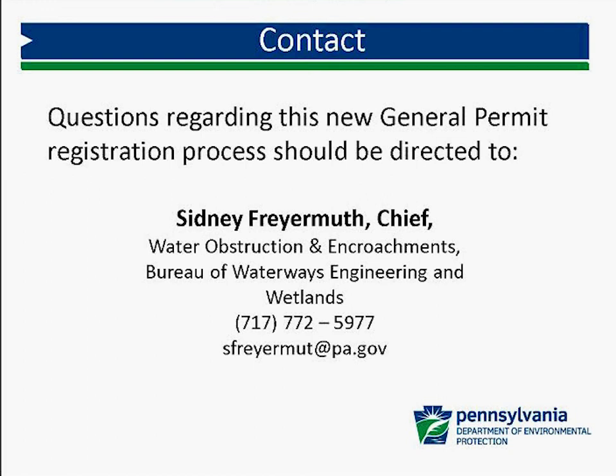Since the E&S plan may be submitted separately, what if the review of the E&S changes the design of the acknowledged GP? Well, the E&S plan should not be changing the designs of the acknowledged GP to begin with. The E&S plan should be based on what has been acknowledged by the department and the GP.